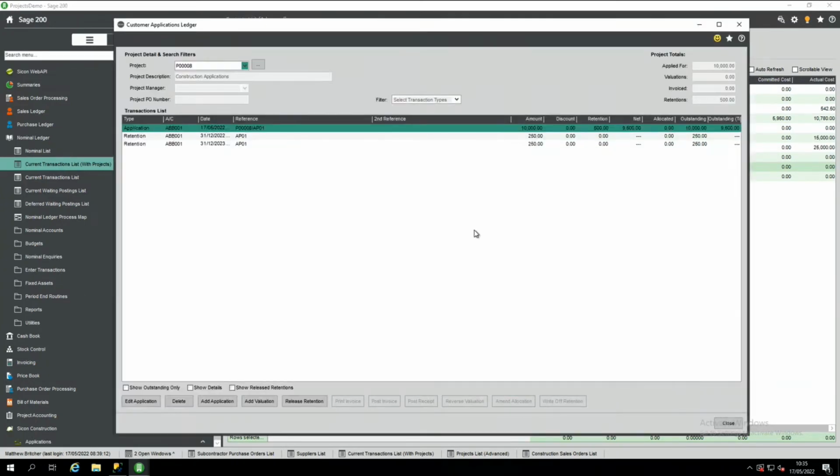So that's our application on the system. As Richard mentioned, the likelihood is it's been supplied. This is how much we're going to apply for, and it's keyed into the system with backing documentation. And if you're lucky, that's done before the certificate's been handed to you. But if that's not the case, then that essentially sits on the system as applied revenue, not certified, but recognized as revenue on the P&L.